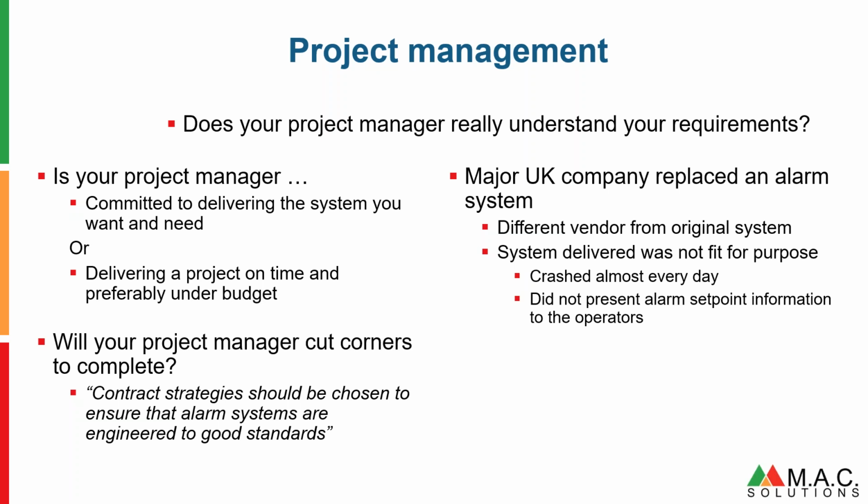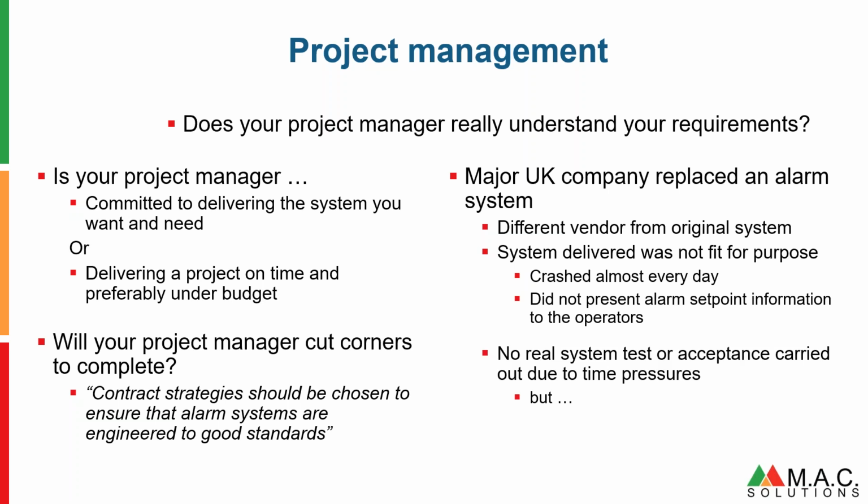It wasn't delivered. The project manager didn't deliver it. The vendor didn't deliver it. So the system was pretty useless. And the reason these things were missing and weren't picked up before it was installed, there was no system test or acceptance carried out due to time pressures from senior management. We've got to get this project done. We've got to get it completed.